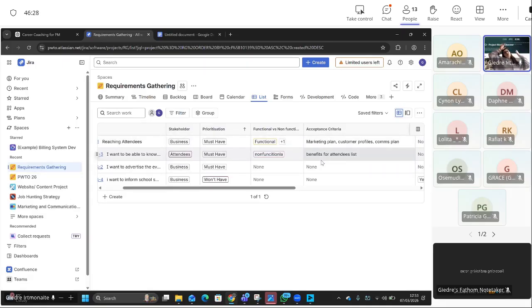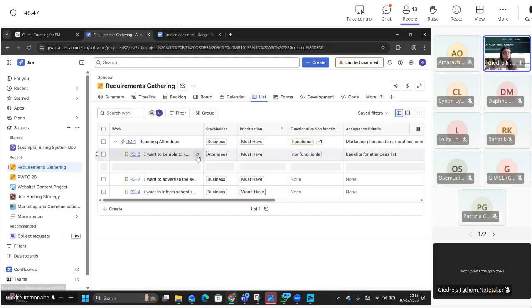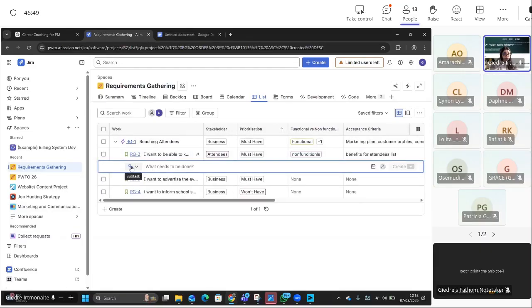So there's two options that you have: acceptance criteria per epic, but then you really need to ensure it doesn't miss out any of the stories' acceptance criteria and you group it. Or you basically just do acceptance criteria story per story, right? Or you can turn tasks into acceptance criteria, right?